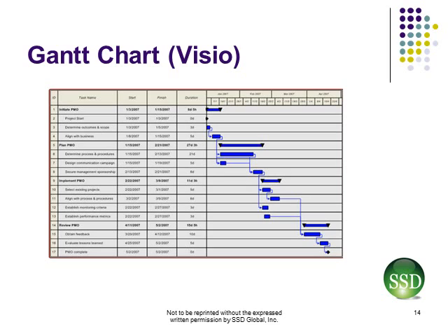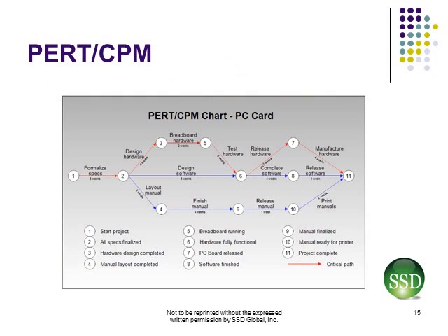Also, from this work breakdown structure in the PDCA, the DMAIC, and basic project management, 2 charts are formed: the Gantt chart, which is a visual depiction of how the project is going. The WBS can also be used to create a PERT chart, which not only shows you the critical path, but the tasks that can happen in tandem.